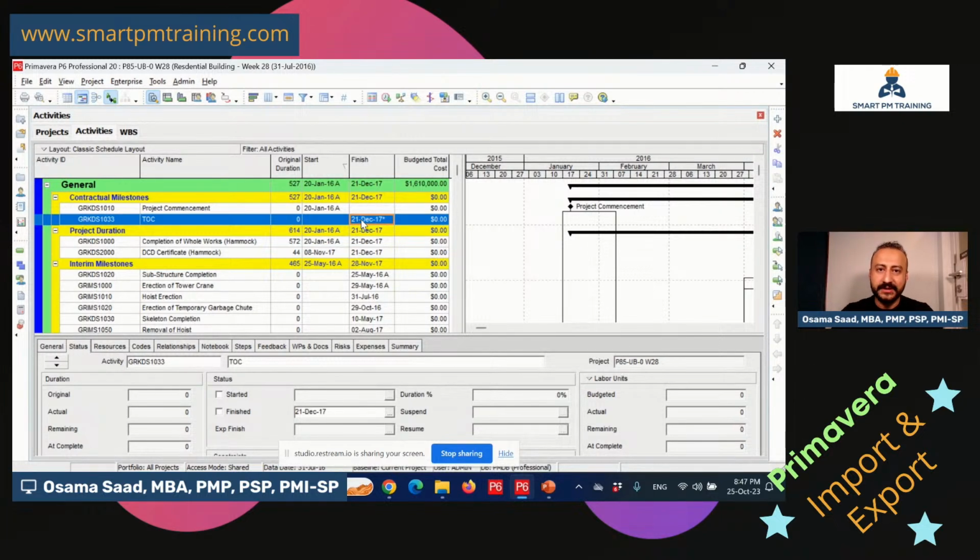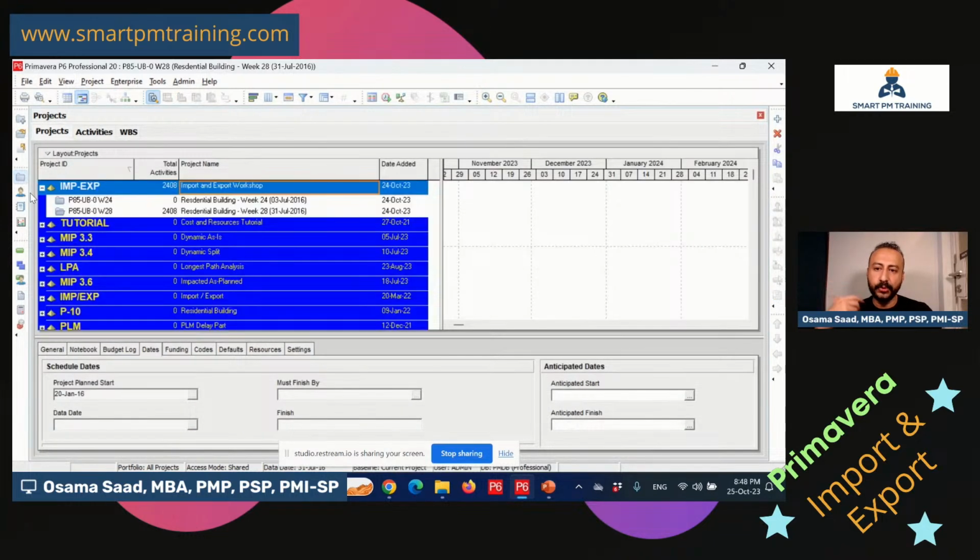Maybe you tried to be smart and do something in the lags, constraints, you changed durations, whatever it might be. You can right now run a schedule comparison or a schedule digger between both files, the original schedule update itself and the bifurcated one. This one right now should have a data date 31st of July. You can see it here at the bottom, 31st of July. So it's a schedule twin, but maybe different logic.